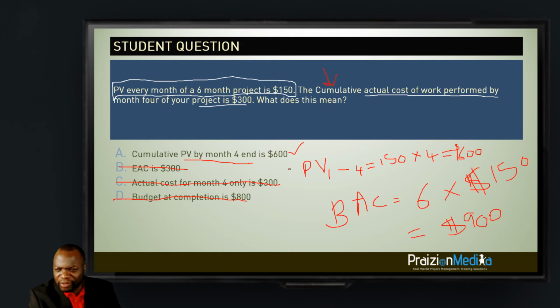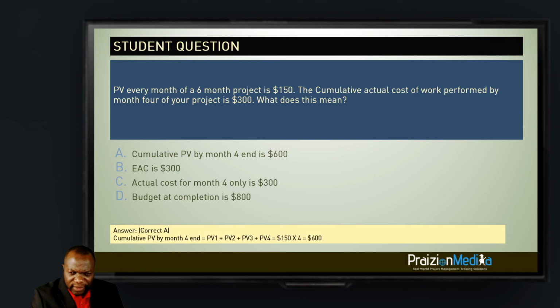That's right, Priyanka. You do not know EV. Awesome. So you guys got that one right. Very good. Let us reveal the answer is A. Cumulative PV by month 4 end is PV for month 1, 2, 3, and 4. Or you could just say 150 times 4, which is $600.